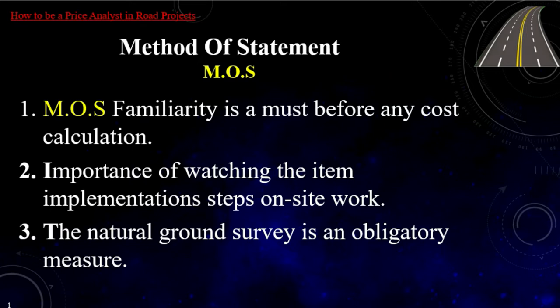This is not only in the road project but in all civil engineering projects. We say it here because it will not be mentioned anymore in the method of statement explanation for any other upcoming items, because natural ground surveying is an obligatory measure before landing any equipment or machine to site work.